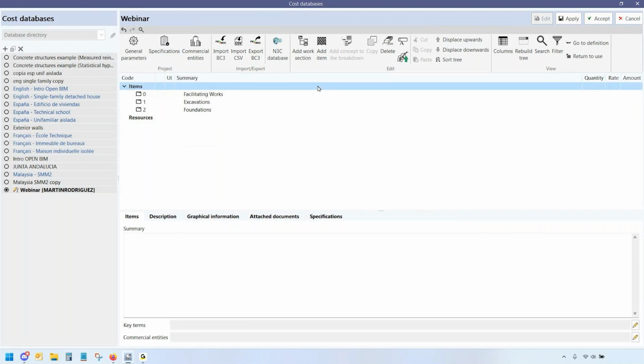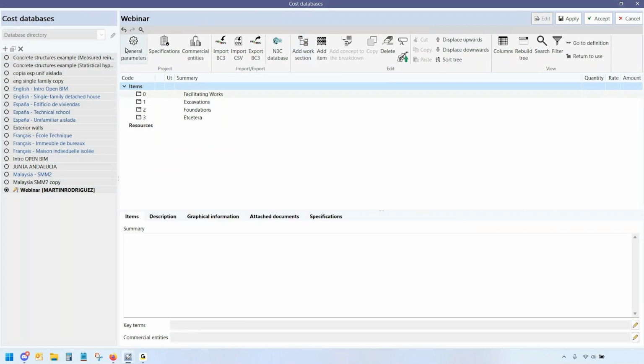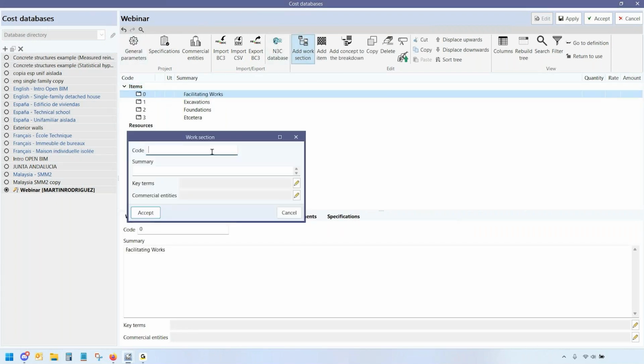There are other standards based on UK old measurement rules, and then in many countries they became mandatory standards, and they state how to organize these items, right? In this case, depending on the area of where you're working, we simply need to put the words and order and organize things in different ways. But it's easy to do actually. So we've generated a work section structure. Let's say 0.1 to generate a sub structure.